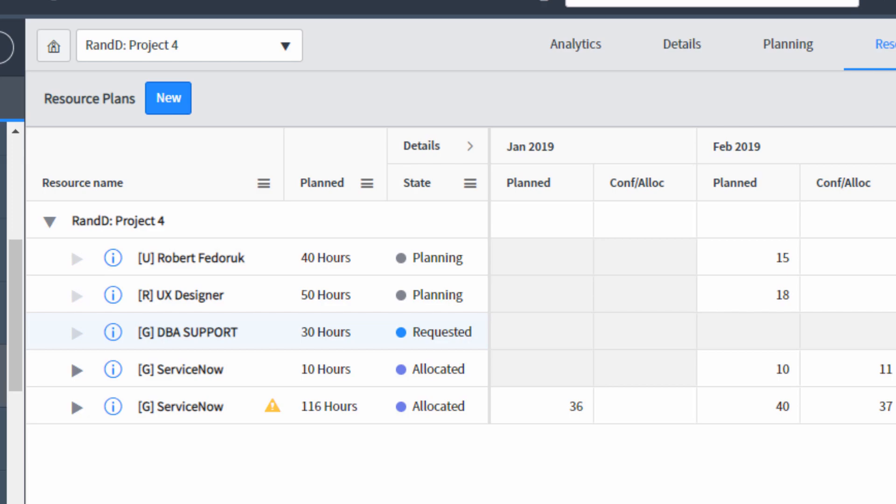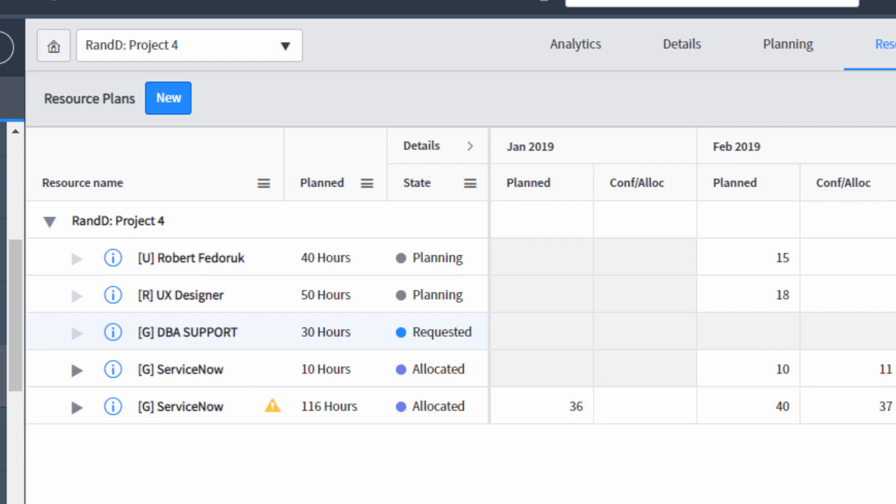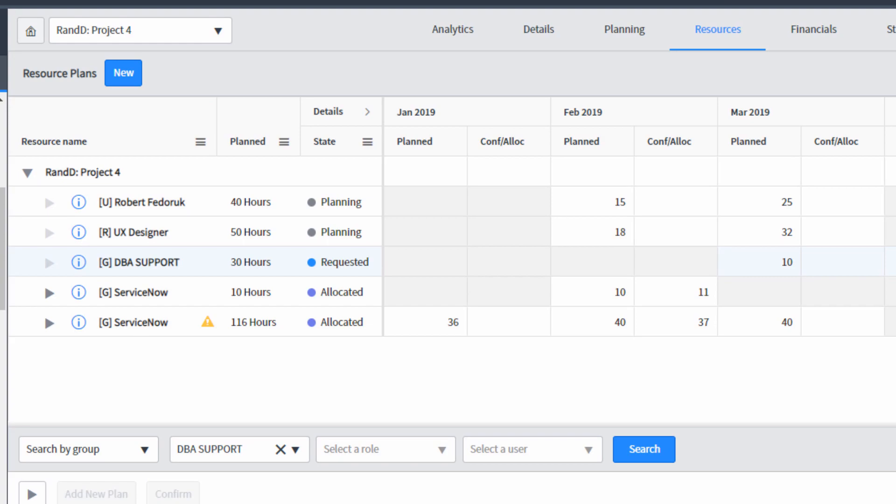You'll also notice on the resource plans a yellow triangle warning sign. This warning sign tells us that the resource plan is allocated, but only partially allocated. And if we look at the plan confirmed and allocated columns for each time period, we can see why. Here in February, we see that there are 40 planned hours, but only 37 have been confirmed and allocated.